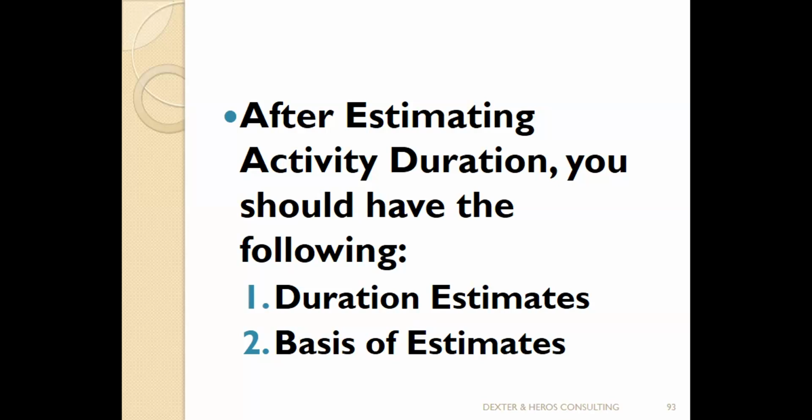The reason why you're stating those conditions is so that tomorrow, if any of those conditions are not fulfilled and the project is lagging behind, a person will not tell you, Kemi, you are not working. You can easily say, sir, remember out of the 20 people that we said we'll be using for the project team, we said we're going to get 15 from within and then hire 5 from outside. I've sent like 4 memos to hire the 5. I've not gotten approval, and this is like the 8th month in the project. And the person you're talking to says, okay, actually, it's not your fault. It's true. You've been working with a smaller number of people instead of the full capacity.